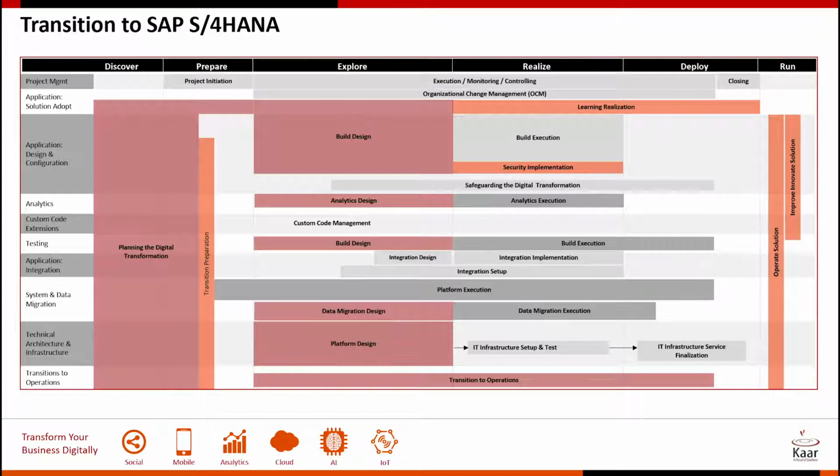And then evaluation of the impact of the technical architecture and the IT infrastructure, because most customers, when they embark on this S4 journey, are still not on a HANA platform. So you would need to understand that a hardware refresh would be required at this stage as well. And one other main deliverable given as part of the assessment phase is a conversion L1 project plan and the resources required, both the resources from the service provider as well as from the customer, because we'll have to work hand in hand with the customer to ensure a successful journey.